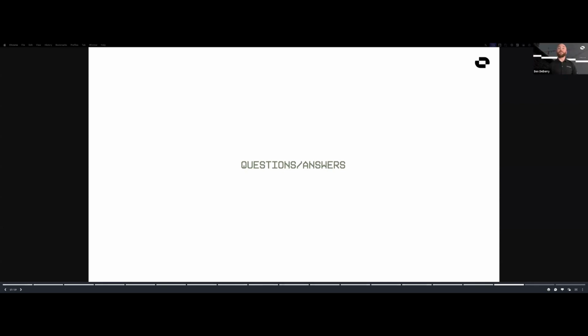Unfortunately, I think we'll need to review your schedule. The baseline function is very powerful, but it has to be a snapshot of your current schedule, and it only takes effect the moment we save that baseline. So we could certainly take a further look at your schedule to better understand. I have saved them both separately, so I could go back to my original baseline and import the.